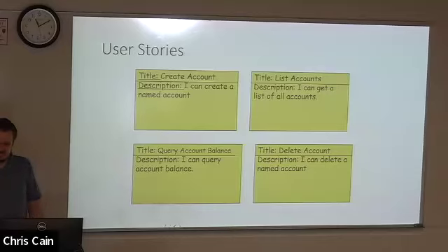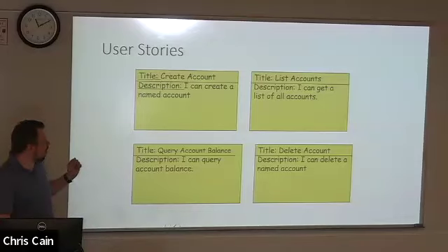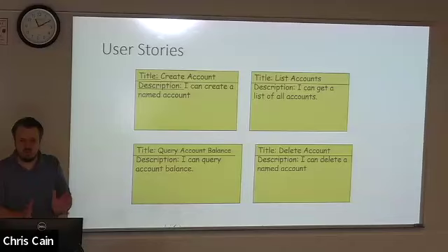Everyone could do that for everything based on what you've described? Yeah, the worst user stories are the vaguest. If you can poke a hole or come up with multiple different ways to consider one of these, then it's a vague user story. You want your user stories to be as descriptive as possible without diving into the why or the how. We'll leave that to the scenario and task part of this process.